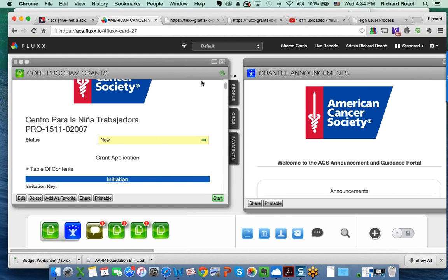Then we can go through that again, and we can come to consensus that that is what the change is, and then we can generate that off as a spec for this form, and then you guys can sign off on that one spec, and then we'll make those adjustments. Okay, that's fine.